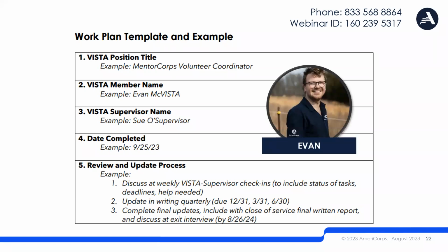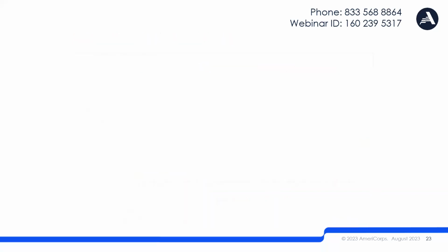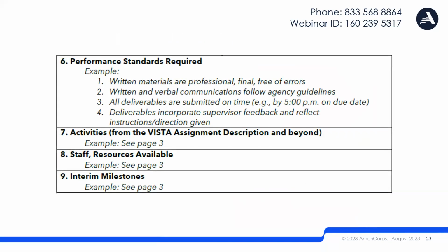Sue O'Supervisor. The review and update process section, which is row 5, indicates 3 specific points at which the member will revisit and update this work plan: weekly supervisor meetings and quarterly and final member updates. This work plan further specifies that these updates will include discussion and writing. The remaining sections of this work plan's opening page are for Evan's performance standards, activities, staff and resources available, and